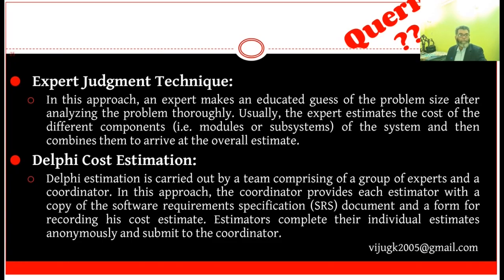There are two classes for heuristic estimation technique: single variable model and multivariable model. In the single variable model, it provides a means to estimate the desired characteristics of a problem using some previously estimated basic characteristics of the software product, such as its size. An example of a single variable model is COCOMO. Multivariable estimation models are expected to give more accurate estimates compared to single variable models, since a project parameter is typically influenced by several independent parameters. For example, the intermediate model of COCOMO is an example for multivariable estimation.